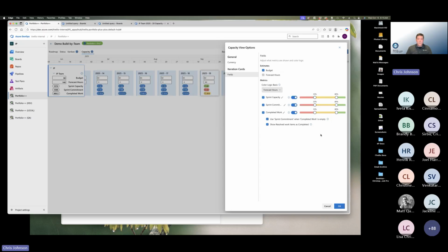If I forecast 80 hours of work for the team, that's the time I have to pay people. But it's also a very common convention for people to sign up for 6 hours of work a day as opposed to 8, so that they have 2 hours to handle other things, including feeding themselves. So we set the tolerance somewhere in this range of what's good enough.